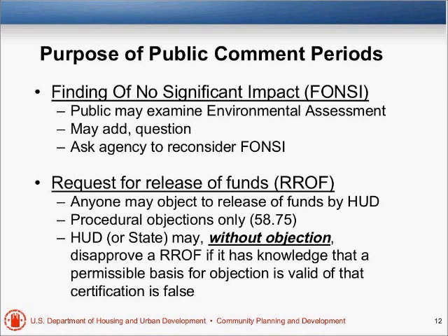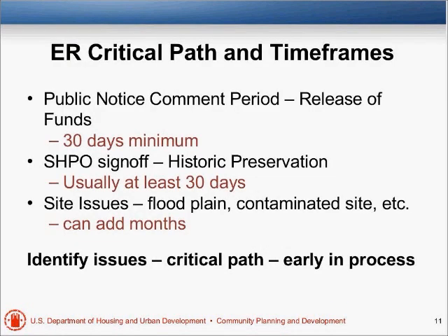Let me just add one little footnote into that, Eugene. I don't mean to complicate the matter, but in addition to the State Historic Preservation Officer, under some circumstances, tribes have to be contacted also. Eugene will show this when we get into the specific historic preservation process compliance actions. But it's both the SHPO and, in some cases, tribes that have special cultural significance for that area, so that you don't dig up an Indian burial ground or something like that.